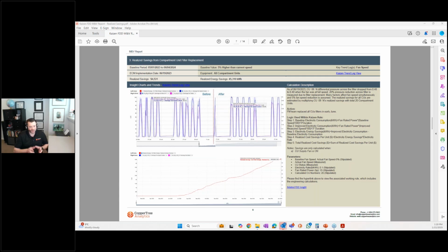So most of the time, we like to be installed before everything's online. If we have good visibility to the project, our box is already plugged into a switch. It might be dark, but it's sitting there. And when the network comes alive, our device flashes up and we're able to discover systems as they come online. A lot of times we have groups of systems, like floor 6 is ready to go while they're still installing windows on some other floor. So we are able to track with the progress.